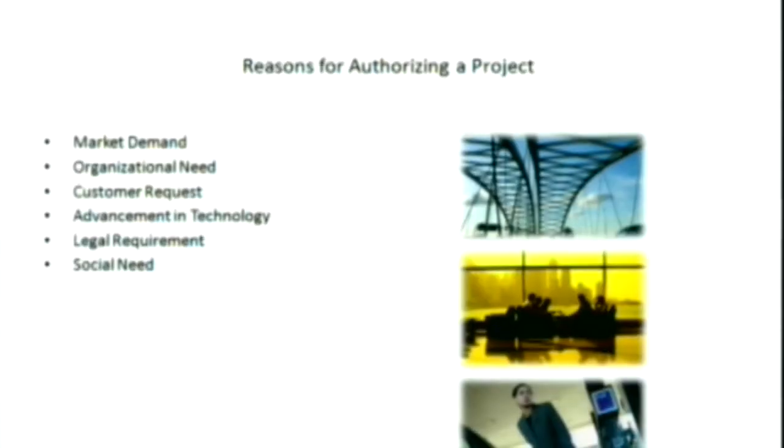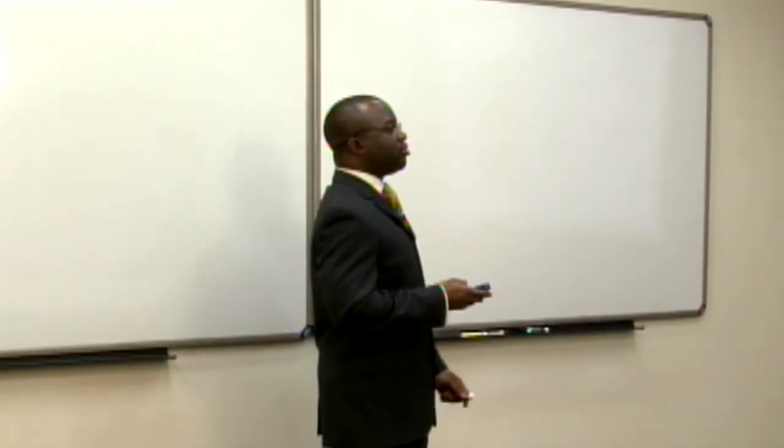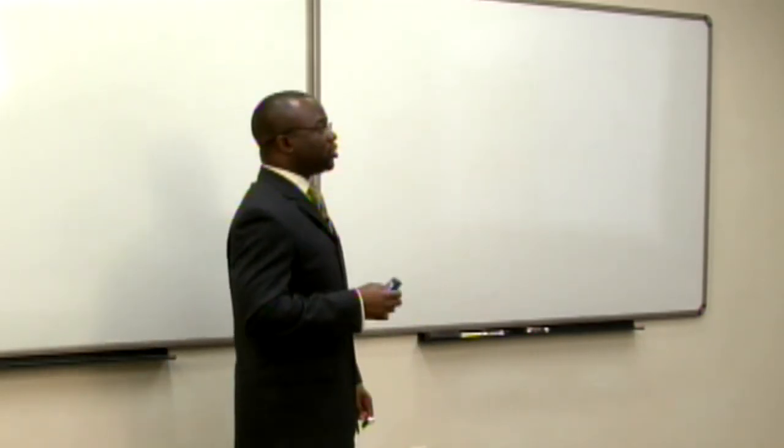So going over to our slide here, we can see reasons for authorizing a project are market demand, organizational need, customer request, advancement in technology, legal requirement, and social need. Those are your reasons for authorizing a project.